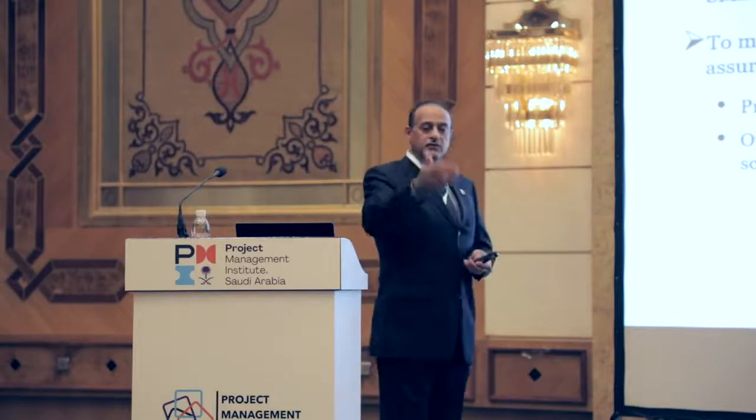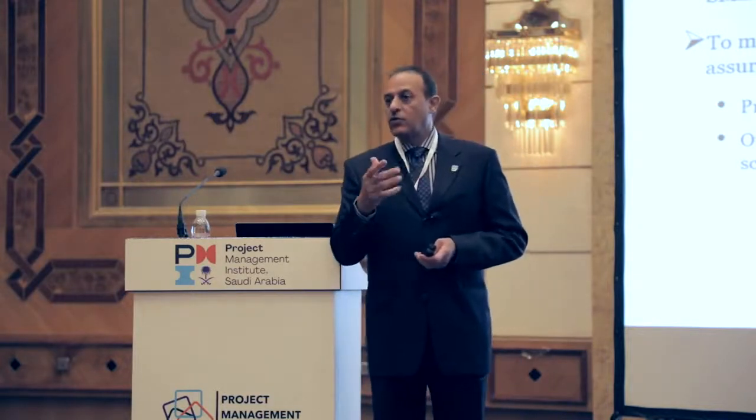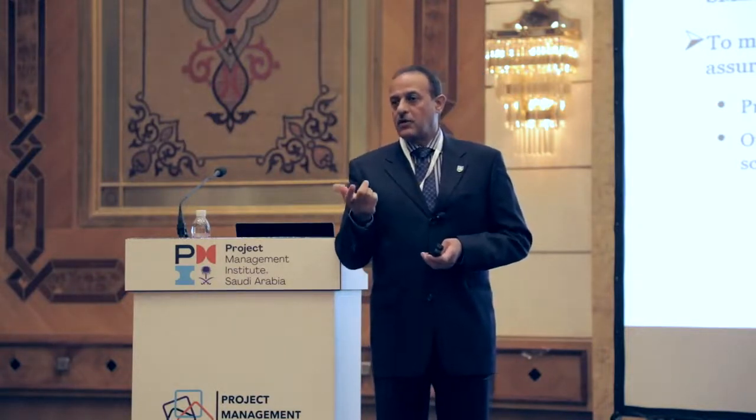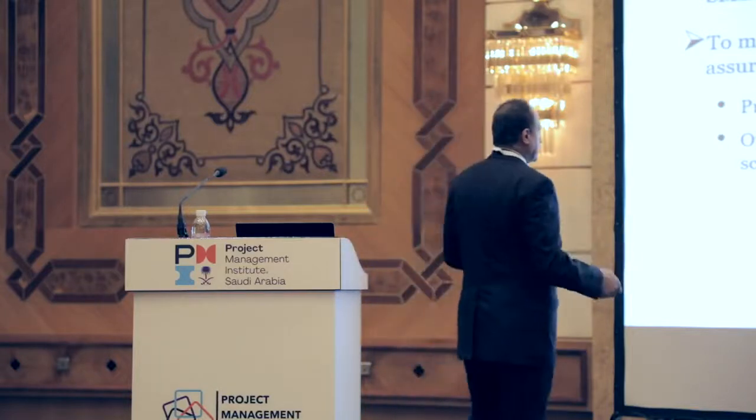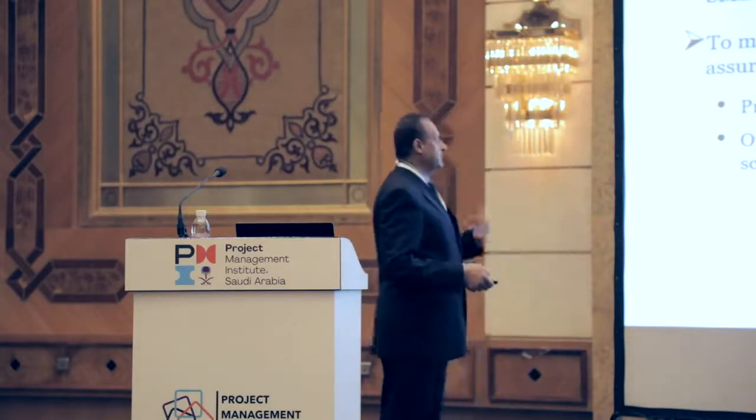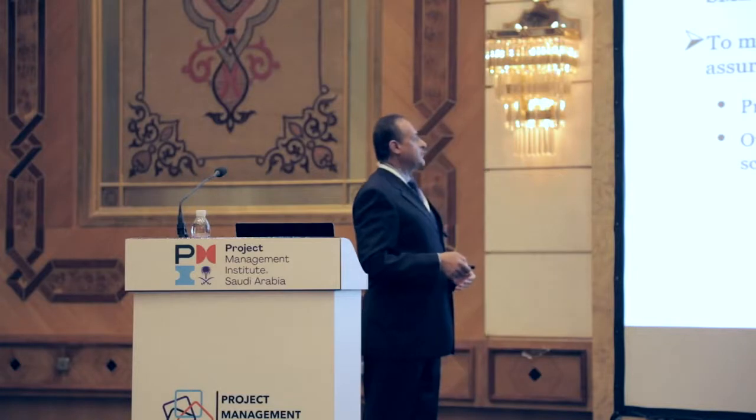These are presented to the decision maker at the gate, and the decision maker will make an informed decision whether to recycle the project or proceed, knowing that these risks have to be mitigated or resolved within the next phase or further later phases.